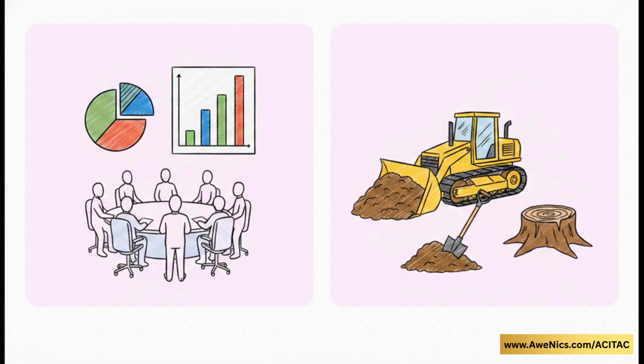And honestly, this is where a lot of planners get tripped up. The difference between a WBS and a task is huge. The WBS is purely for management review. It's the bird's eye view. Tasks, on the other hand, are where the actual dirt gets moved. Tasks are for on-site execution. They have measurable quantities, they take specific effort, and they require resources. So, while site clearance is the WBS package management sees, clearing and grubbing or cutting of trees are the actual granular tasks the site crew is sweating over.